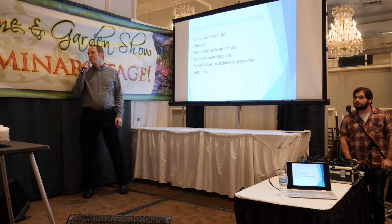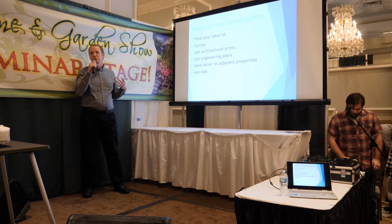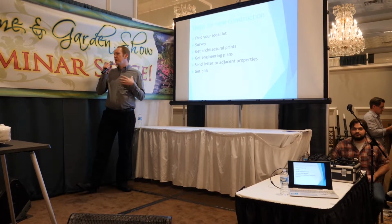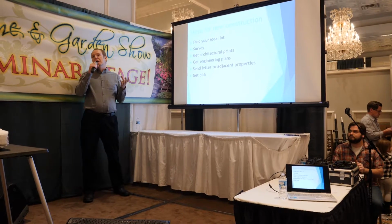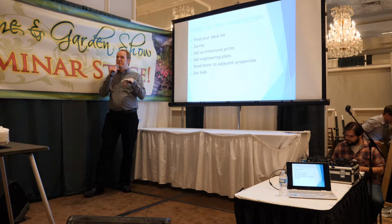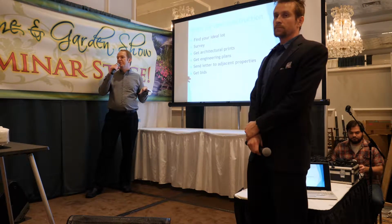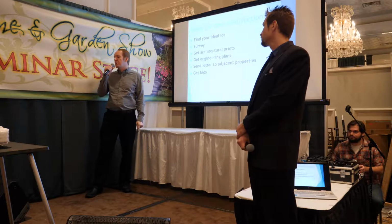All right, so the first step you want to do, and some of you may have already done this, is find your ideal lot. So you want to find the location where you're going to build it, and then get that picked out. Because you can have an architect design a house for you, but then you'll have to have the house fit the lot because of the variations and zoning and all that stuff. So ideally find the lot that you want, and then from there you can design the house that you want.